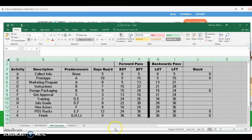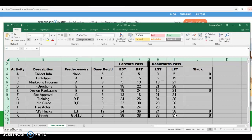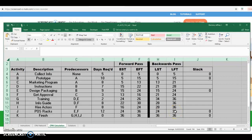On the backward pass, you're going to look at an activity and look forward instead of looking at the activities that have come before it. Since we know the duration is 36 days, the latest finish time for the project is 36 days. Activity K is basically just the finish, so it starts and finishes on day 36. Activity J is a predecessor for the finish, so J finishes on day 36, and thinking backwards it must start on day 24 because of the 12-day duration.